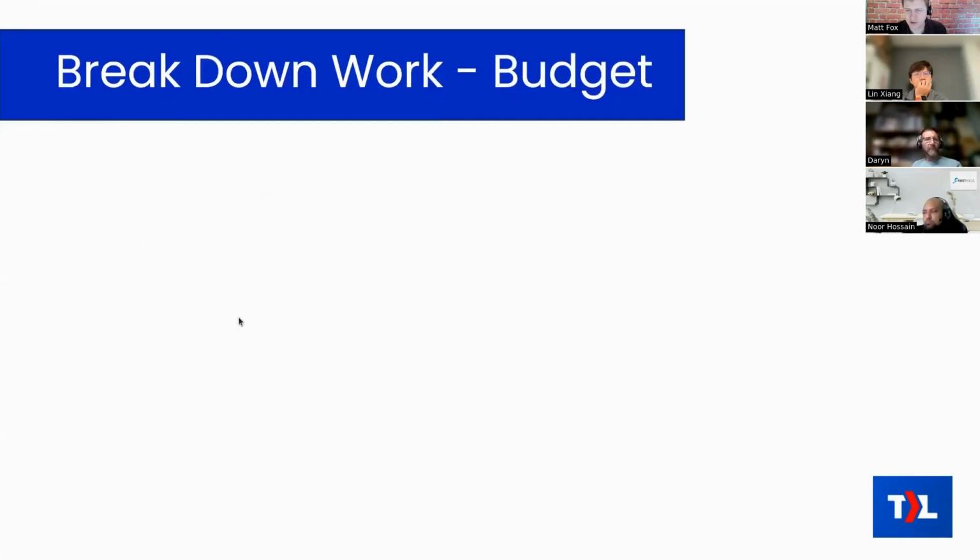Okay, I said I was going to talk a little bit more about the budget. So you can enter a budget or story points. I mentioned, if you're doing your budgeting in hours and you come out with more than 15 or 16 hours, cut it down to 2 tickets or more.